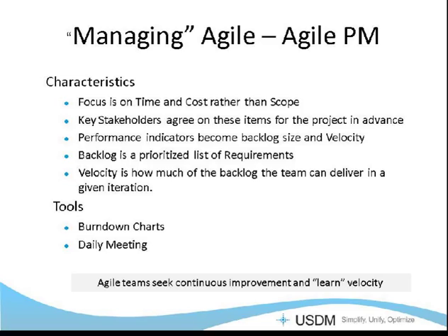So one of the companies that I worked with recently planned on points, and I've seen that many times. They assign a functional requirement, and then the developers pick a number of points for an iteration, and the organization, the software developers, learn over time as they continue to do this how many points they can deliver in a given iteration.